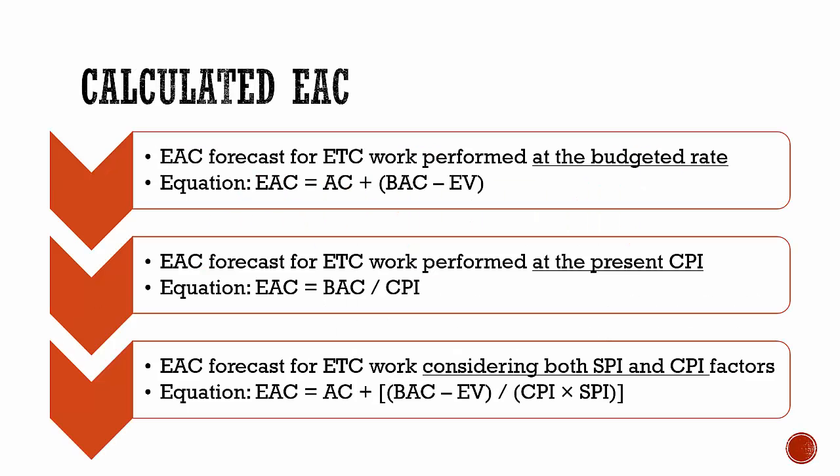The most often used forecasting approach is a manual bottom-up summation by the project manager and the project team. The project manager's manual EAC can be compared with a range of calculated EACs representing various risk scenarios. When calculating EAC values, the cumulative CPI and SPI values are typically used. The Earned Value Management method can quickly provide many statistical EACs.